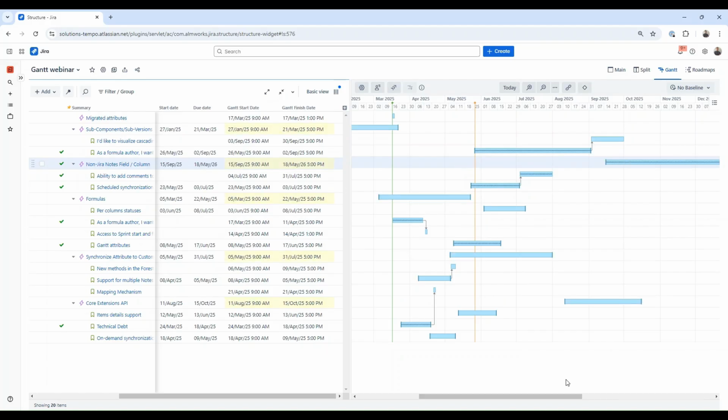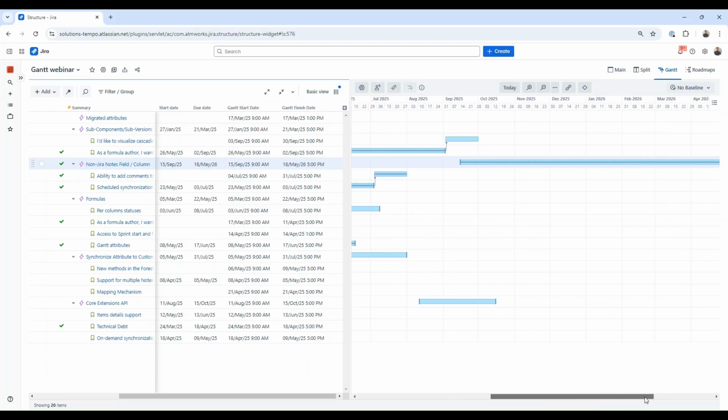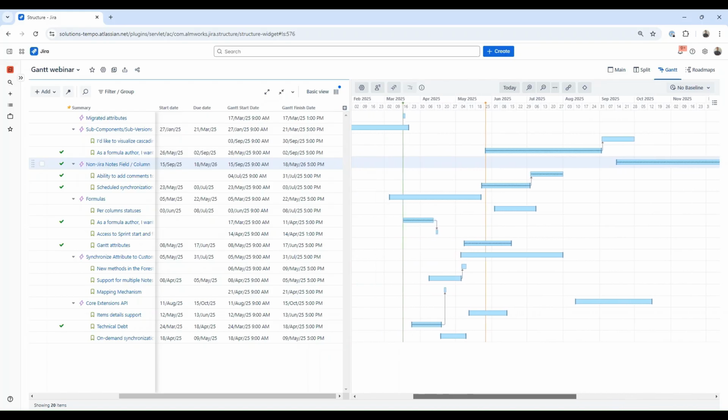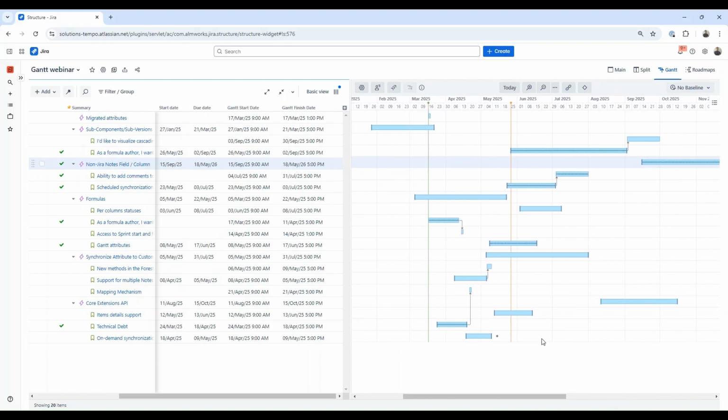In this scenario, parent tasks use either manual dates from assigned fields, or, if they are auto-scheduled, dependencies or the project start date. The scheduled position of their children would not affect them in that case, and if any of the child items is scheduled outside of parent boundaries, there will be no warning by default on the chart. So this mode may work in some specific agile or loosely coupled project setups.